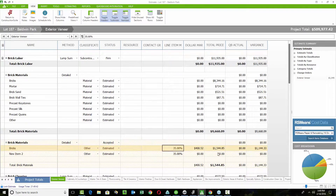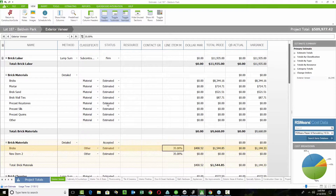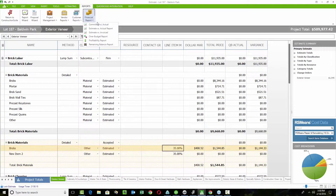If we've got a 22% margin target, we could do the math for the exact number, or just say let's make it 35% to make a little extra money on that change order. When this goes over to QuickBooks, QuickBooks still has the option to pull that out and put it in the markup column so your QuickBooks estimate versus actuals report still reflects everything accurately — the estimated cost versus actual cost, and estimated price versus invoiced amount.